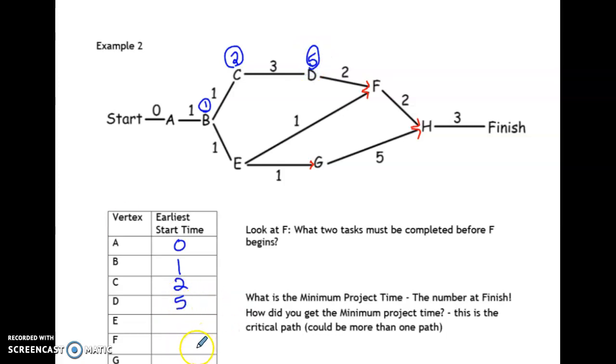Okay, I'm going to jump down to F. So D to F, we took photos. C was take photos of clubs. D, take photos of sports teams. So 3 days for clubs, 2 days we spent on sports teams. So now we're up to 7 days.